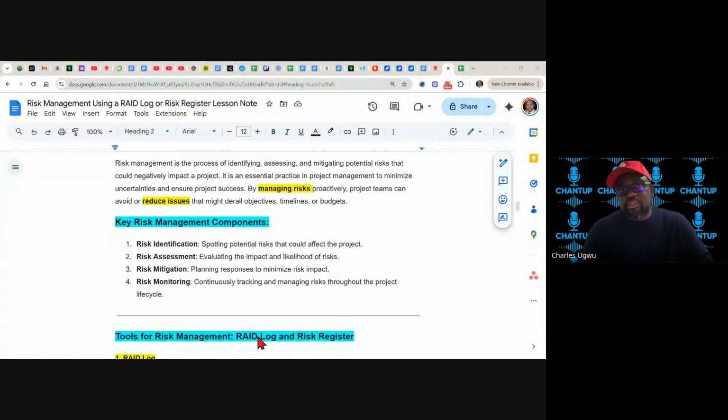Something like a team member's laptop crashed. If you're a project manager, you make sure that we have spare laptops in the storeroom at all times. So if such a thing happens, you just go to the storeroom, sign one to the team member, and they continue doing their work.